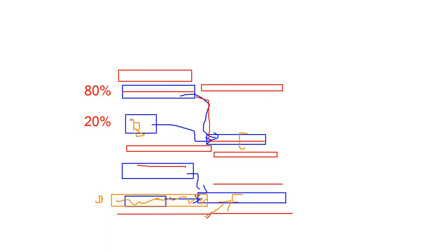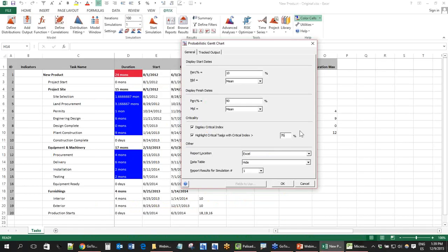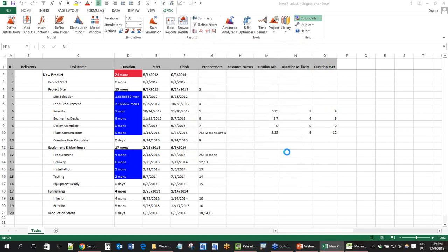So now you have a different way of seeing tasks, right? Because before you had a flag that said it is a critical task or not. So in this case now you have this critical index that I'm going to show you, and you have to have a threshold to select which tasks you're going to take maybe a deeper monitoring because they are critical tasks, right? And you will do that with a critical index.